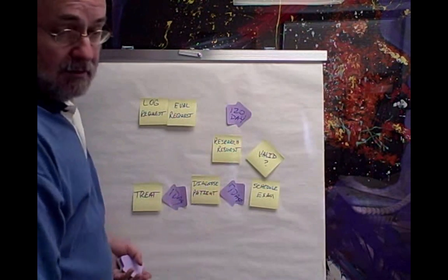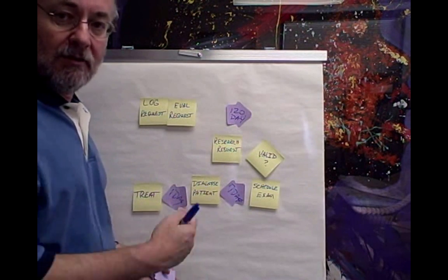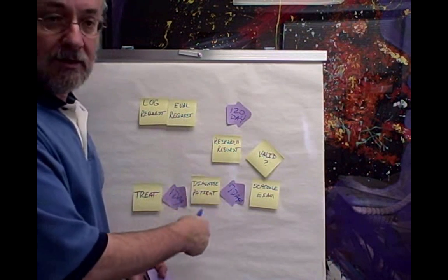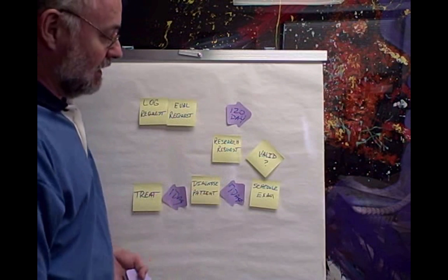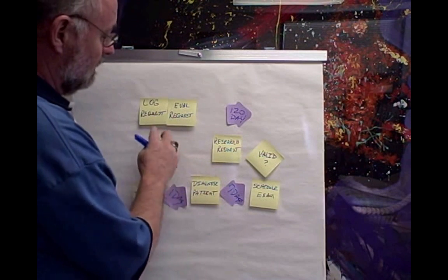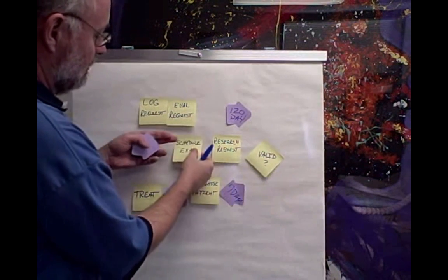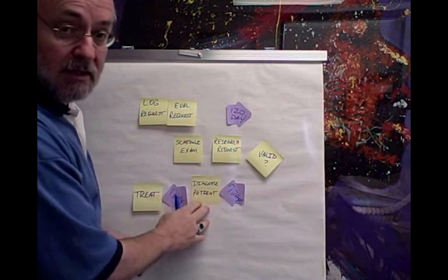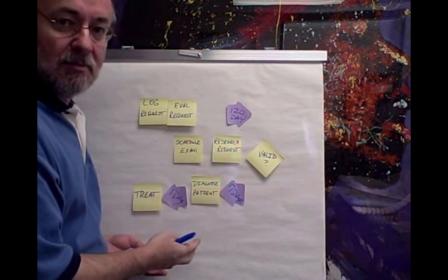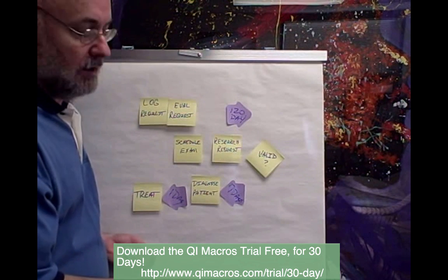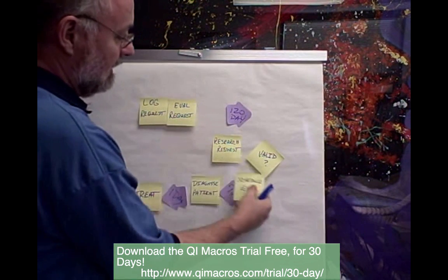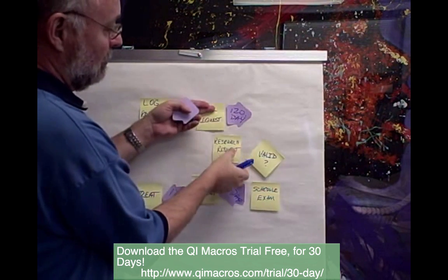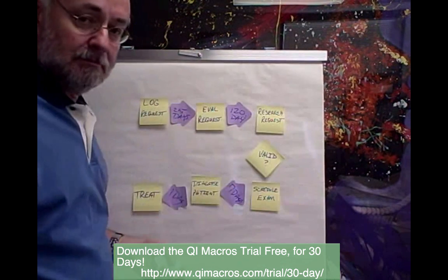And the doctor said, well, we can usually tell from looking at the patient whether what they're asking for was really caused by what they say it was caused by. And so, literally, we could take it and go straight to schedule exam, eval, schedule, and get right into diagnosis. And they actually cut this process down to about a maximum of 30 days now. And that's how easy it is to redesign and reevaluate a process using value stream mapping.